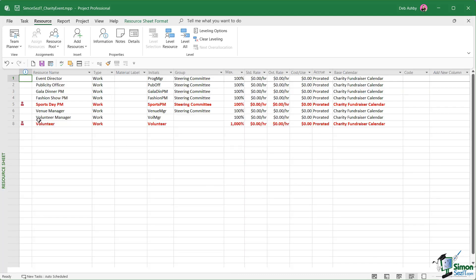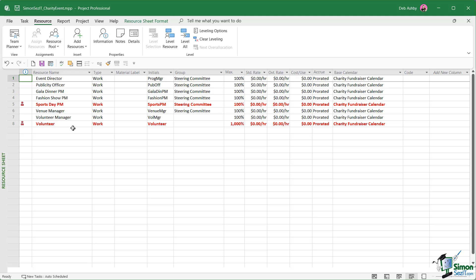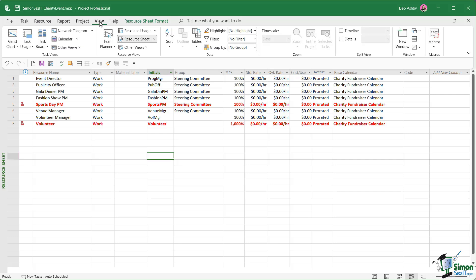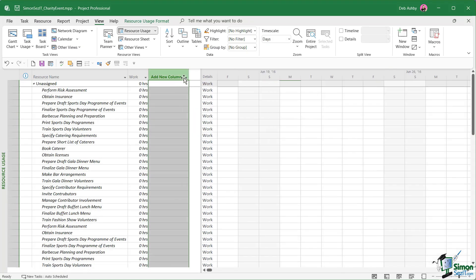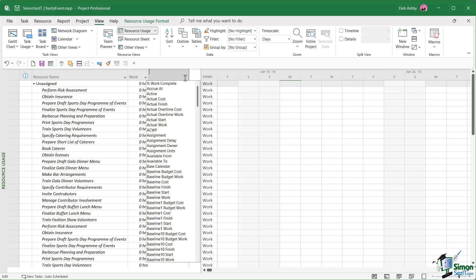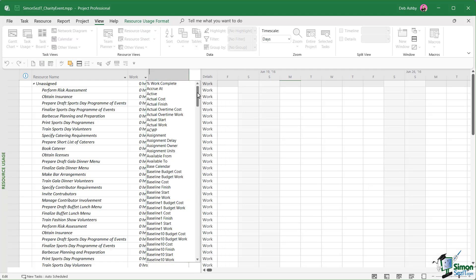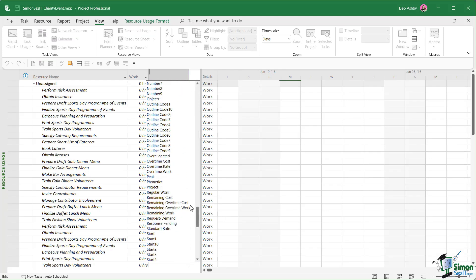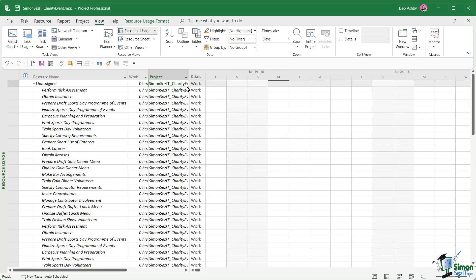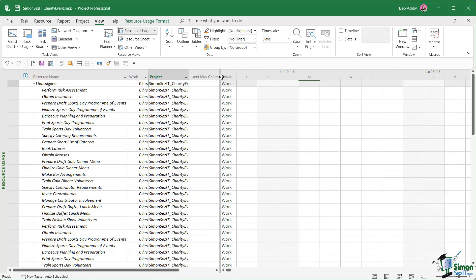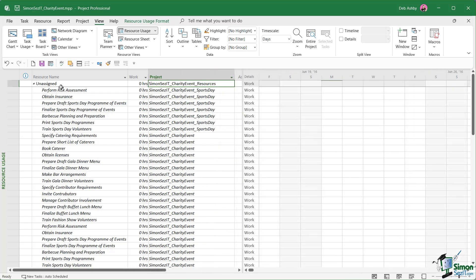As I mentioned, if we go back to our resource sheet, we now have these over allocations. Something that can be really helpful is being able to view which resources are assigned to which projects, that can be very helpful when it comes to dealing with over allocations. For this, we're going to switch to resource usage view. Let's widen out this column and we're going to add a new column so that we can see the project that each resource is assigned to.